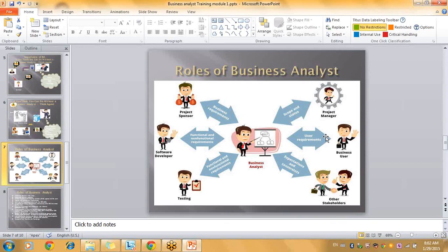Then he will go to the testing team and say, what is your hours of estimation for that? It will get 30 hours. Then if the project manager asks me, do you really think that particular requirement needs 40 hours? Then I will say, from my perspective, it is this much only. What do you think? Then that kind of negotiation happens. But we as reviewers will be there, while the main work is handled by the project manager.